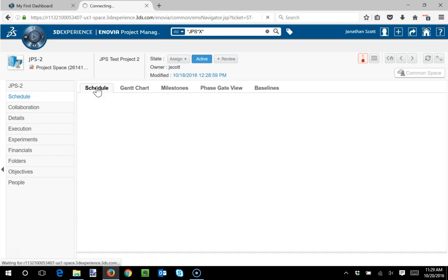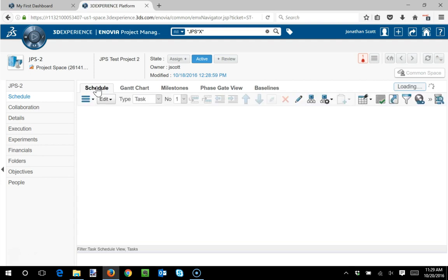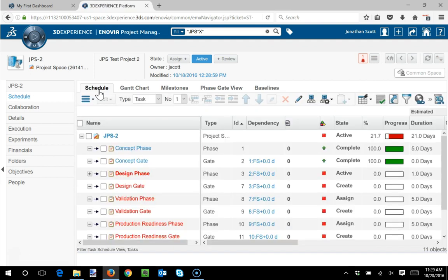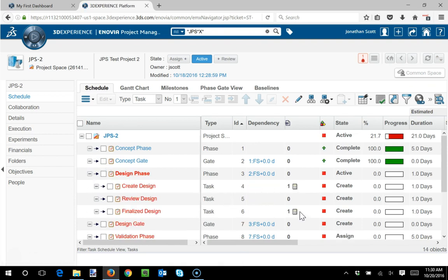But to put this document management in context of what's done in a project, let's attach the document as a deliverable to a task. And why is that important? Well, we can see we've got a couple of those going on already, but I'm going to do this one more time. The reason it's important to have your documents, files, other deliverables connected in is because the status that's reported here, right, our progress, our visual indicator of where we are on the project, can be connected back to the status or life cycle of those documents.